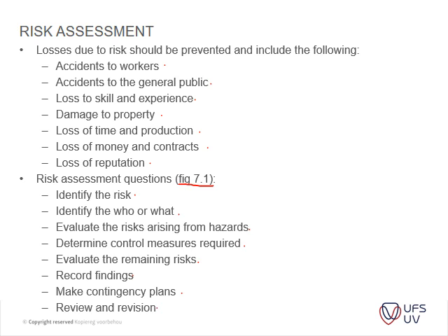Usually your health and safety consultants start with a baseline risk assessment, and each month they do an audit and identify risks. But that doesn't mean that we as construction managers should not look at risks. For instance, some companies have ISO regulations which require you to look at your risks at least every 2 weeks and not monthly, but that is dependent on each company.